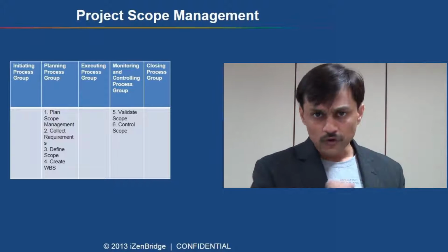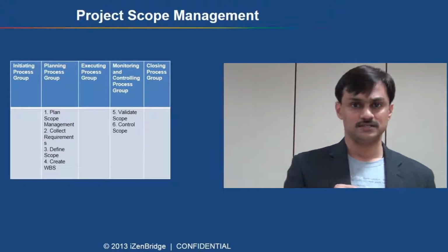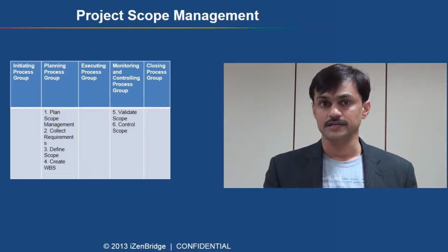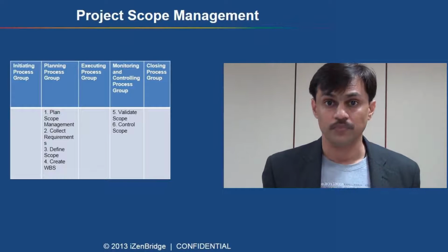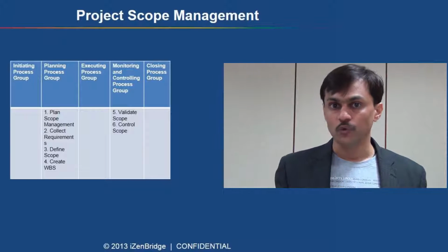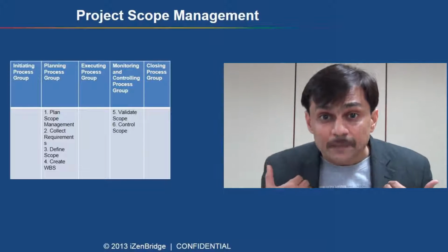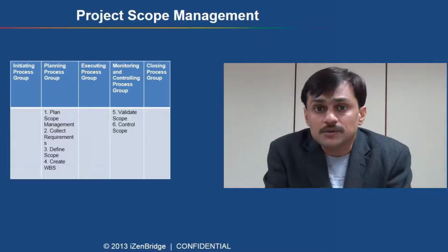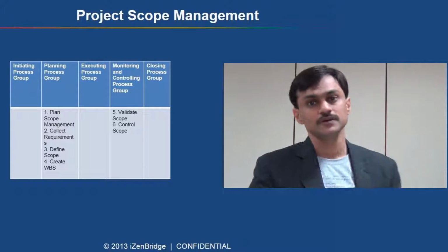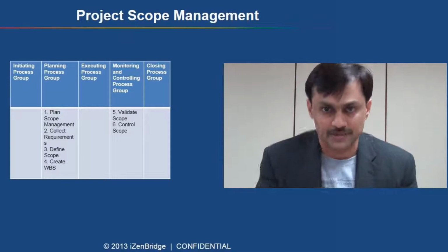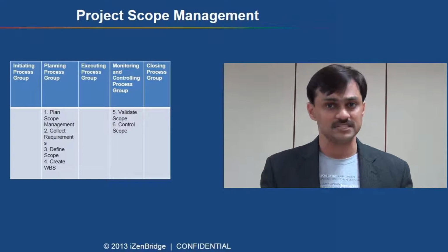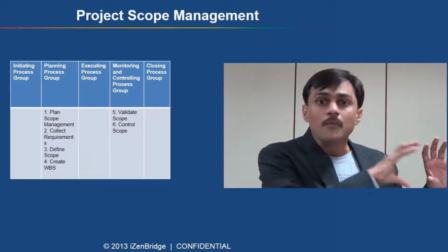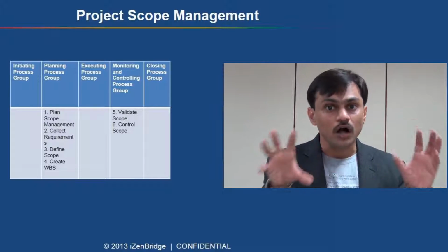or visualized before. We have one more process that also falls under the monitoring and controlling process group, and this process is about validate scope. Now validate scope has to do with taking customer acceptance for a given project work. In this process, we go to the customer and we share, these are our deliverables, these were the acceptance criteria, now accept it. We seek customer acceptance. So when you prepare for PMP, you can expect a good amount of questions